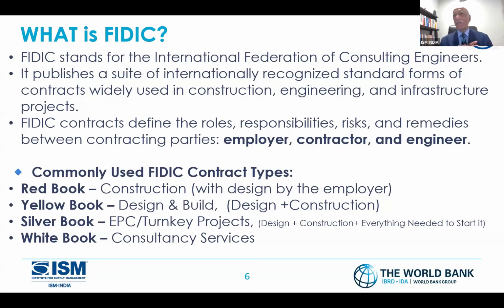The most commonly used FIDIC contract types: if I started my journey 30, 40 years back, the very first book was the Red Book. Construction: any big construction work where the design is done by the employer. Then there's the Yellow Book, which we call design and build.